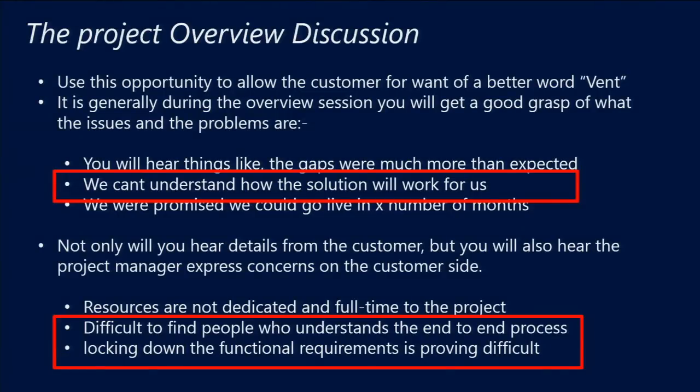Do your interviews with your SMEs, sit down, segment the demonstrations in 2-hour lots, and in those 2-hour lots, we're going to run through sales order processing end-to-end, including all discounting. Now, what you're doing is you're starting to expose the solution to the customer in analysis. So instantly, they're starting to put their mind around the process of the application that you're demonstrating.